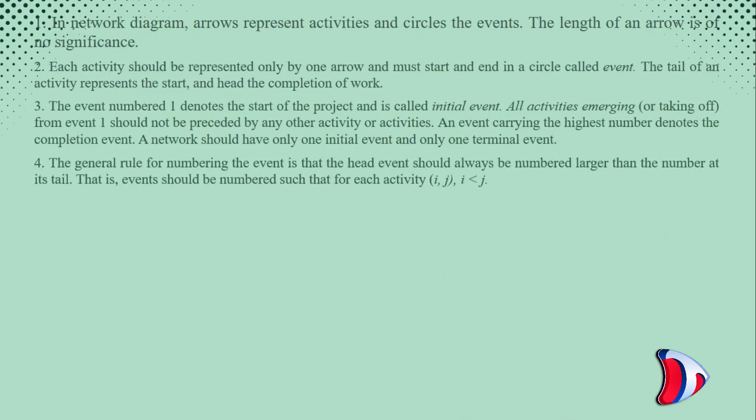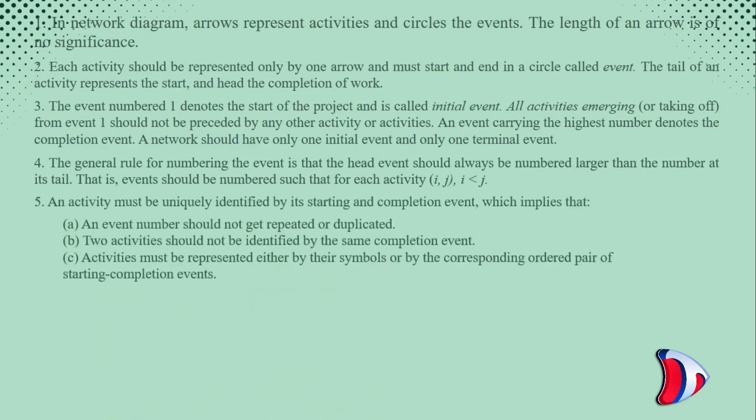The general rule for numbering the event is that the head event should always be numbered larger than the number at its tail. That is, events should be numbered such that for each activity i,j, i is less than j.